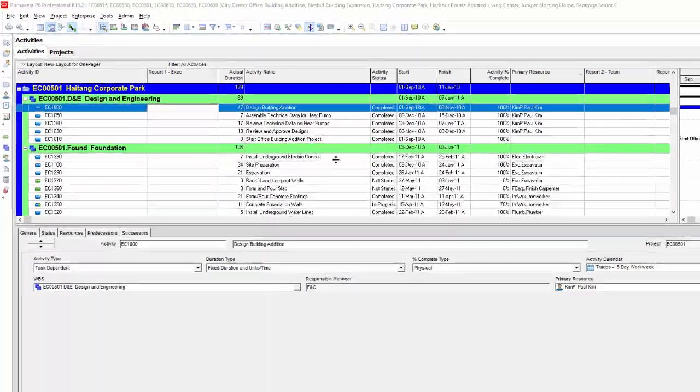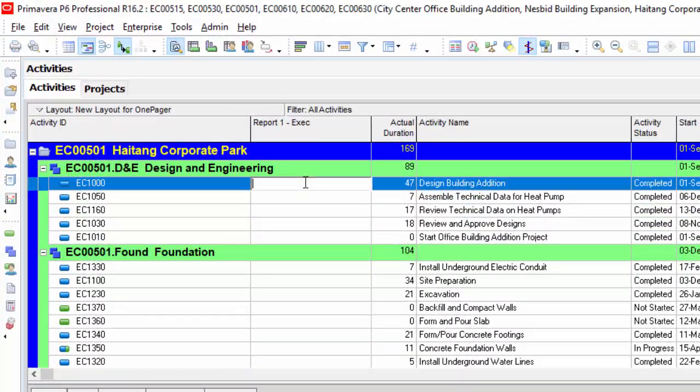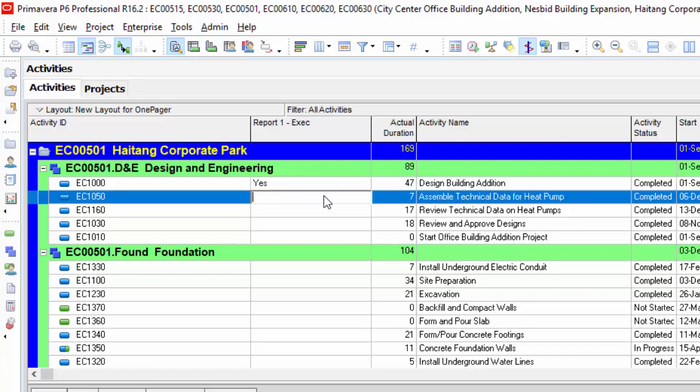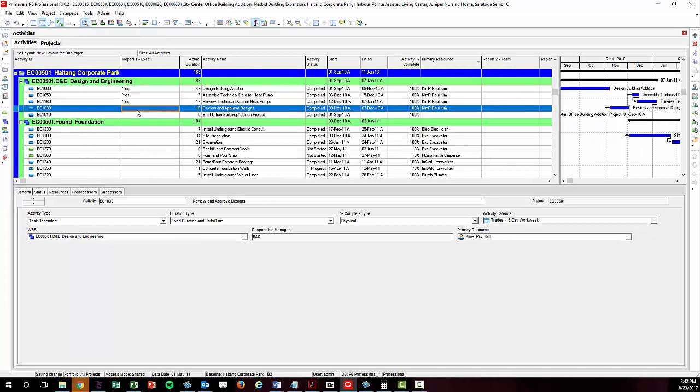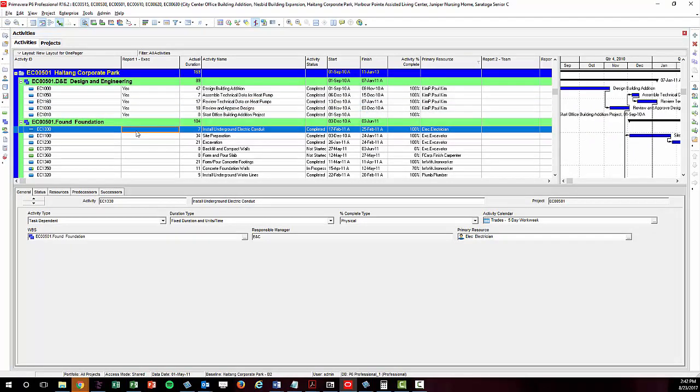Once it's there, just put a yes value next to the tasks and milestones you want to display in OnePager. You can then include this field and its values in your export mapping so it will be present in Project or Excel and use it to have OnePager quickly filter which items you want in your visual.